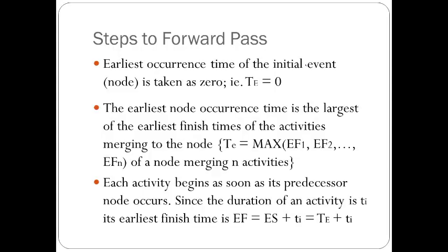And now we're going to go forward. We'll look at the earliest node. So we start from the beginning here. The earliest start time for our events is just 0. We just count this as 0. That's the earliest starting time. Okay, and then the earliest node, so that's for node 0. This initial event is just like the start.